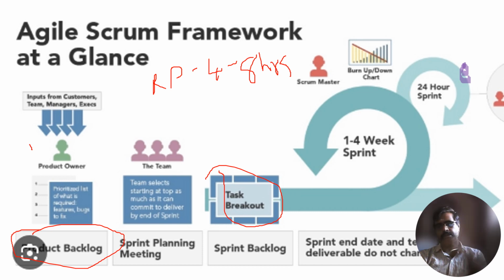This meeting, that is the daily Scrum meeting, as a part of the sprint, as a part of the Scrum, should be ensured by the Scrum Master. Any other issues or risks are put in a parking lot. We are parking the car in the parking lot, right? Same like that, any other issues or risks can be put in a parking lot to be taken up later offline with only the required stakeholders. So which people are required, we need to consider those people only.